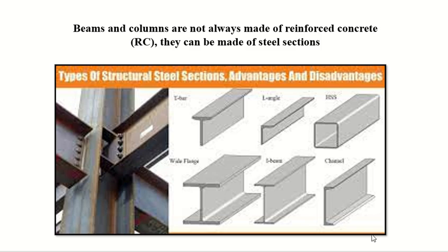If I'm using an I section, it has a standard size, so I don't have to think. I will open the manual, find this size of the I section, and see what the weight is. Done. Just multiply with the length. So steel calculations are easier.